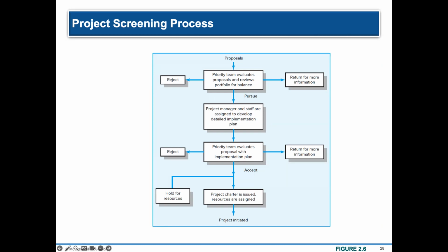So once a certain proposal is decided to be a go, then the project manager and staff are assigned to develop a detailed implementation plan. This implementation plan will be submitted and reviewed alongside the proposal by the senior management or the project team.